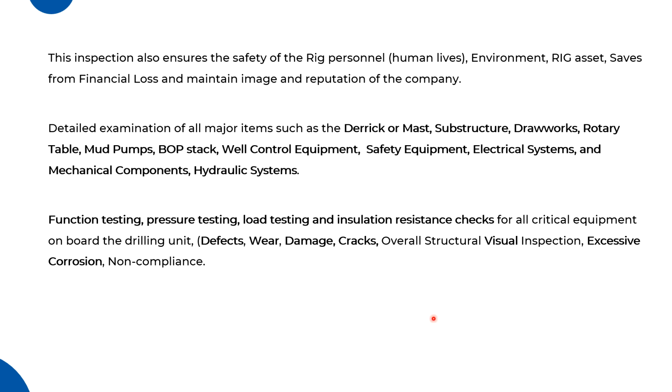So if they find this kind of discrepancy in the inspection, they mention it in their report, okay, and advise the contractor to take remedial action. Okay, and after taking the remedial action, the rig contractor can start the drilling operation.